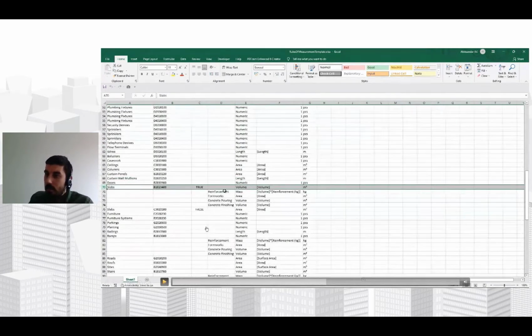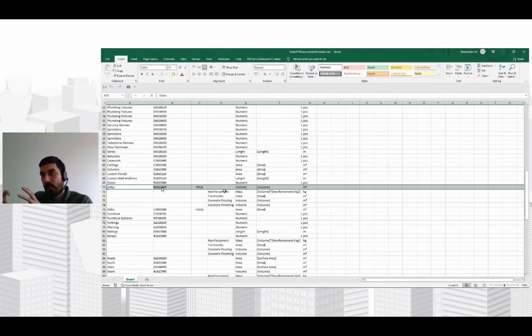And not only that, you also have the ability, let's say, for the group of works that is dedicated to structural slabs in this case, to predefine for the algorithm to introduce sub-activities for these specific groups of works, because those are, let's say, concrete elements.